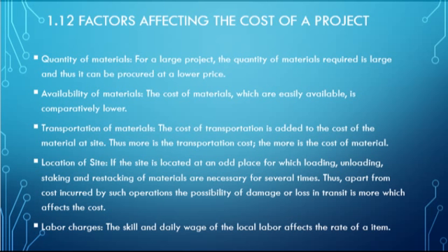Location of the site. If the site is located at an odd place for which loading, unloading, stacking and restacking of the material are necessary for the several items, then apart from the cost incurred by such operation, the possibility of damage or loss in transit is more, which affects the cost. I can say that for a hilly region, at a place where the geographical location is very bad, this will increase the cost of the project. Next is the labor charges. The skill and the daily wages of the local labor affect the rate of the item.